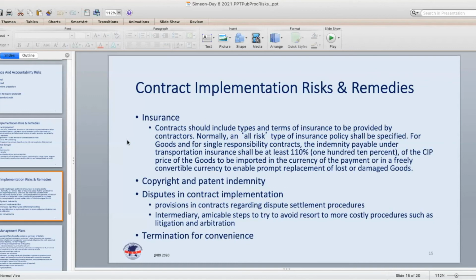So, for example, if there's certain medical equipment that has to be procured to respond to a disaster or an emergency, but then at a certain point in time, that contract continues to be valid, but the emergency has ceased to take place, or the emergency response has moved on from the immediate aftermath to later stages in emergency response, the original supplies are not needed anymore and don't need to continue to be delivered. There should be a right to, basically, terminate that contract.